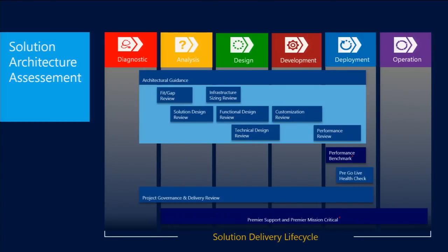Performance review. What we're finding in practice is that if we do the single user trace, doing the trace analysis on the top key processes, we can usually find about 70% of the performance issues just by doing the single user trace before we get to the load and scale testing. And so one of the important things is, again, build that into your best practices, build that into your development, right? Doing the trace analysis now and analyzing that and remediating it will pay huge dividends down the road, okay?